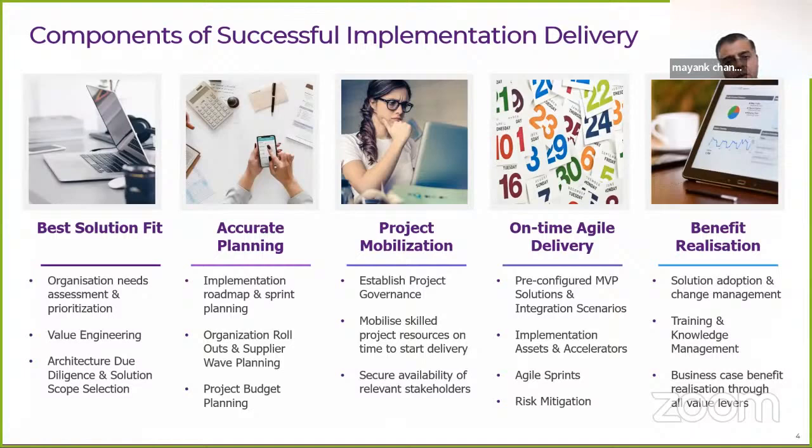And then it's very important, even if a solution is a great solution and can give you great business value, to understand your current technology landscape. Does it fit well into your existing landscape, or do you need to make changes? What are those changes? What are the prerequisites for this solution to be a good fit? There is something called architecture due diligence that needs to be performed to understand how the system connects with your existing landscape, how it replaces the existing landscape if needed, or how it is going to scale up with the existing landscape or support the growth of your enterprise. All this needs detailed architecture due diligence. So I highly recommend that pre-planning is done and the right solution fit is established before embarking on an implementation project.